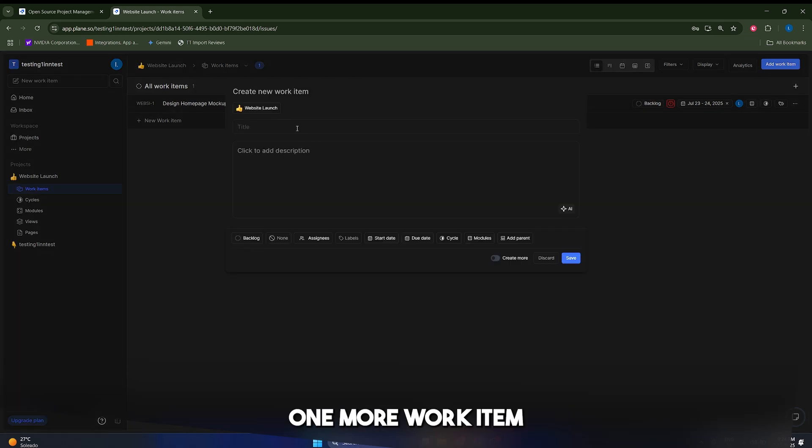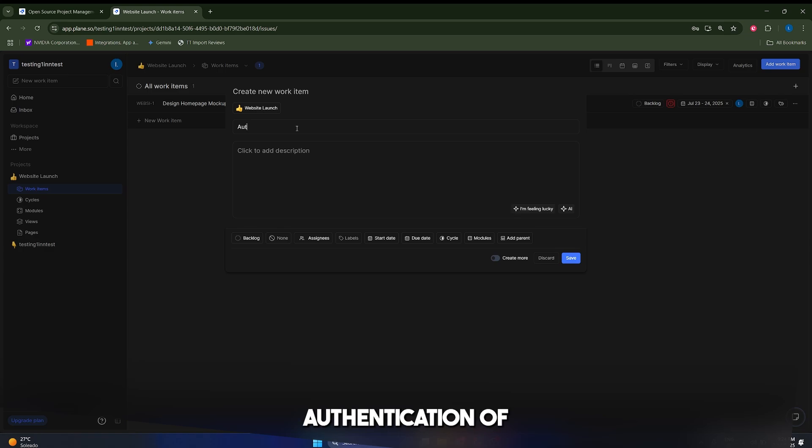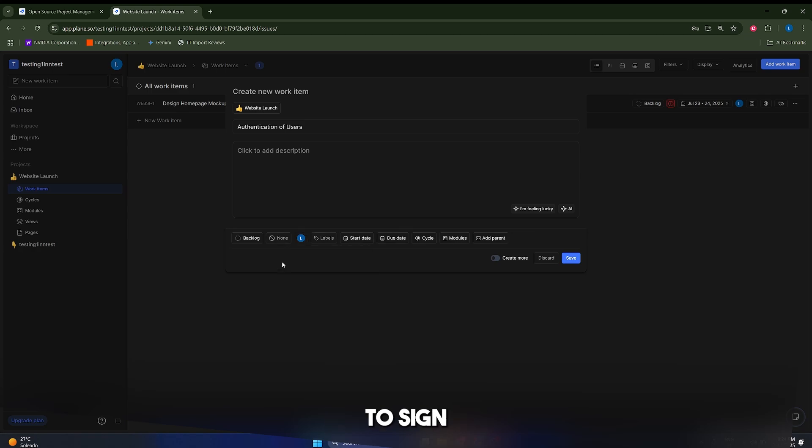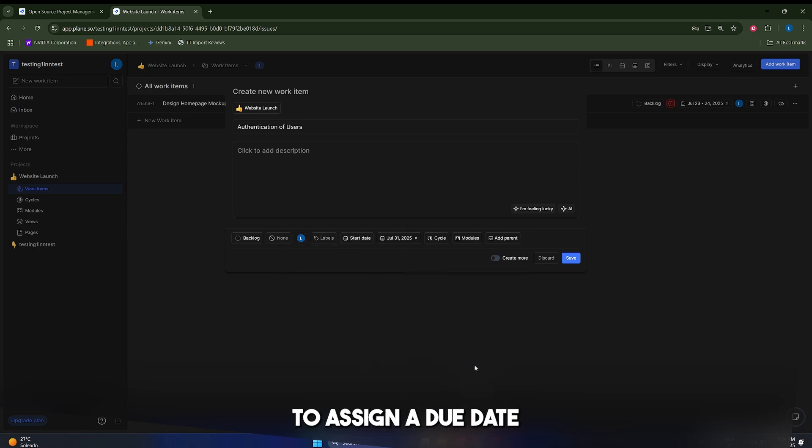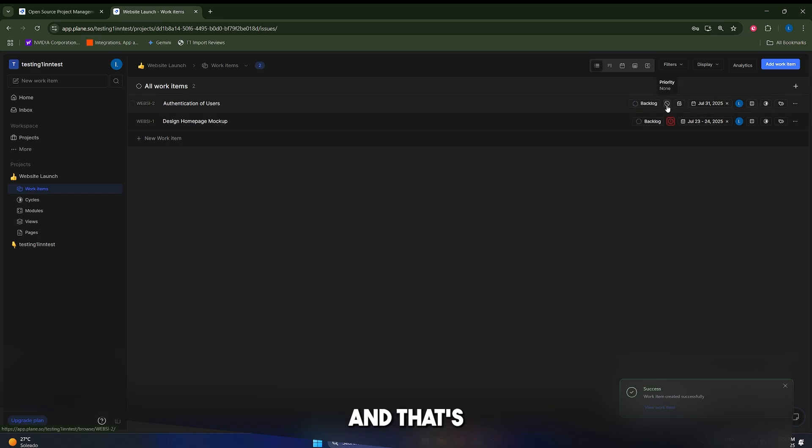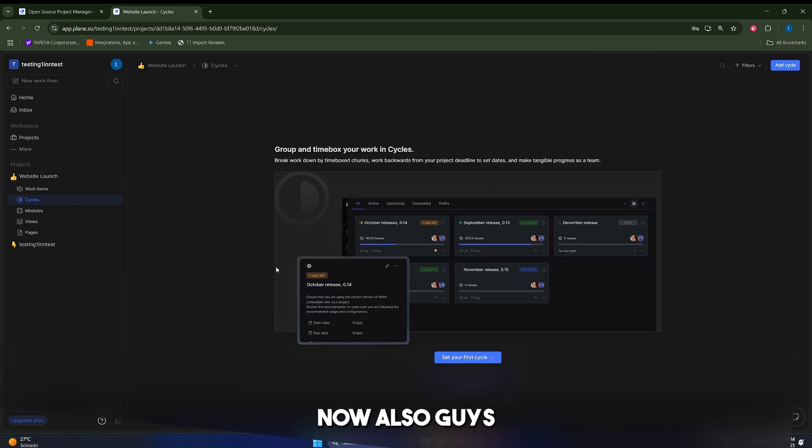Let's add one more work item, which is going to be authentication of users. I want to create a system to authenticate users. In this case, I'm also going to assign myself, and I'm going to assign a due date in one week. So let's click on save in here, and that's going to be low priority.